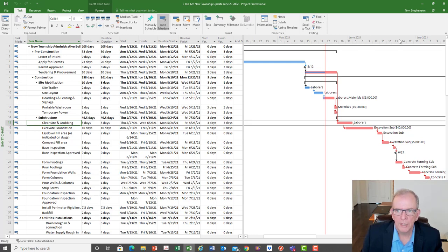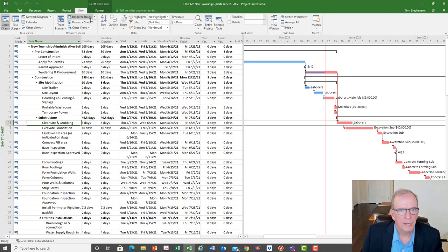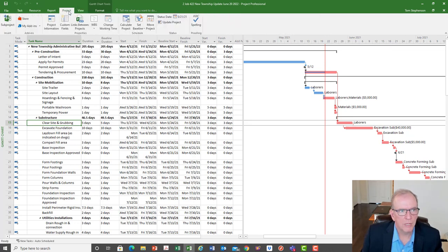2022, but 21. And so then you would change your status date, and your status date would be under project. You would go to status date, May 21st, and now you would go to June 20th. Of course I picked a Sunday. Okay, let's make it the 18th. Okay, and we click the 18th, and now the next status date is here.